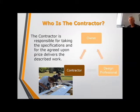And there's no question that the way it works in this industry, and other industries, is that engineers, including ourselves, are very, very competitive in the cost of the specifications, because once you do the specifications, you generally do the contract administration, and the contract administration fee is typically more than the specification. So associations don't want the contract administration portion of the job to be an open check. And like I said, we have found that it's generally 4 to 6%.